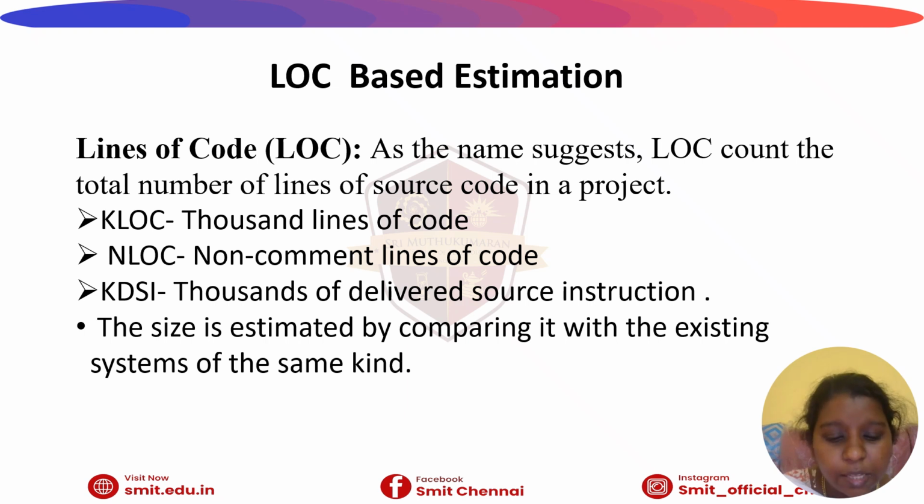Some of the steps in LOC are: it analyzes the requirement. First, it studies the customer requirement, and then divides the system into modules. Then in the estimation of each module, it analyzes how many lines need to be developed. Here it refers to the historical data. Then it puts in the effort needed to develop each line of code, and it also calculates the person-months, which we have discussed in the COCOMO.